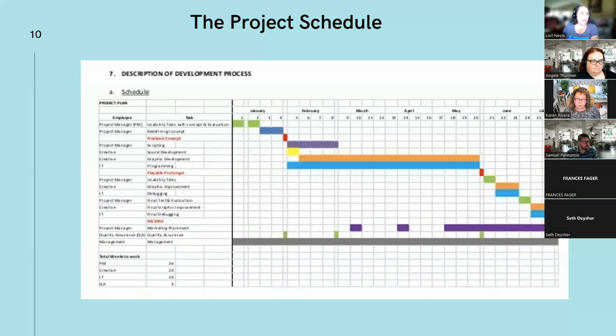In the case of the probability of capacity being a risk, I know that there might be 5 labs in my area and maybe 2 out of the area that I could use for this testing. So the probability might be high, but the impact might be very low because I have options.